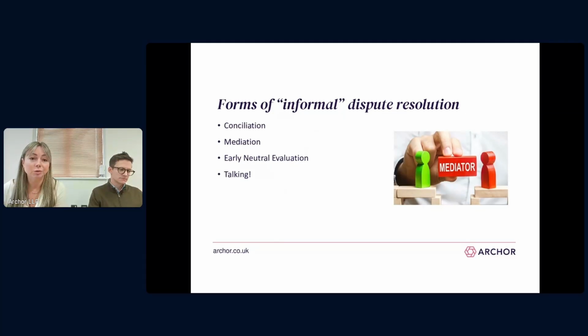So mediation is more common than conciliation, but mediation tends to happen as part of one of the more formal dispute resolution procedures. Parties in court proceedings are now obliged to mediate in order to try and settle the dispute. Normally this takes place once the parties are aware of the claim and the defence, but before witness statements and expert reports are exchanged. But realistically, this can happen at any point, right up to the trial.